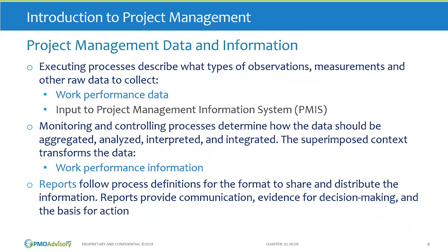Throughout the process groups, you'll be generating and managing a variety of information. During initiating, you create the project charter. During planning, you create the project management plan. During the executing processes, you will be recording work performance data. This is basically raw information about the project performance.